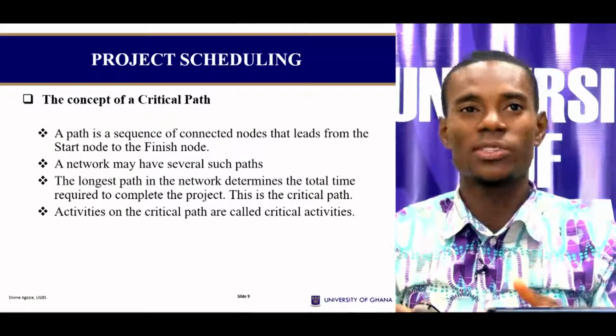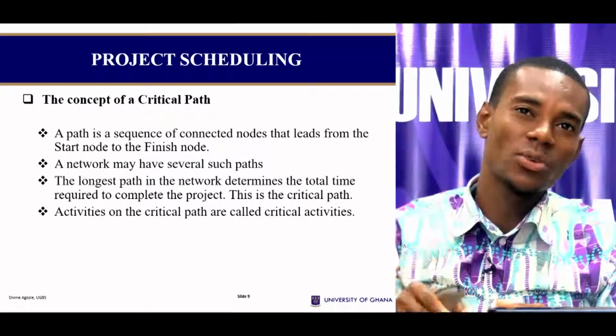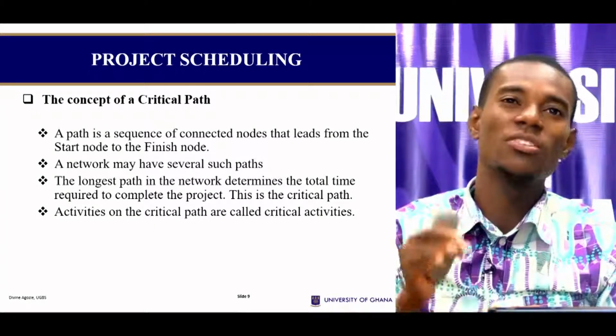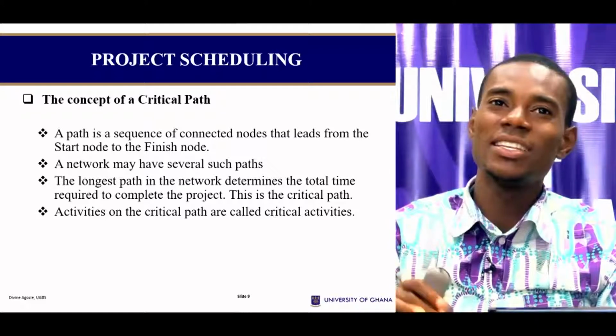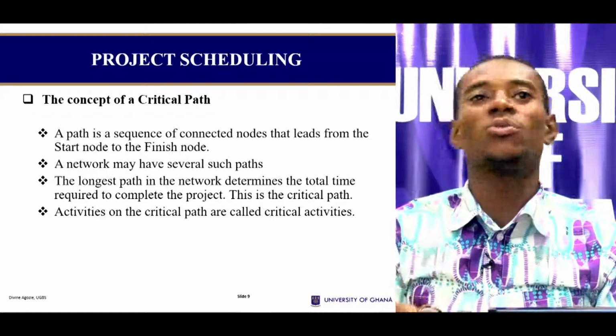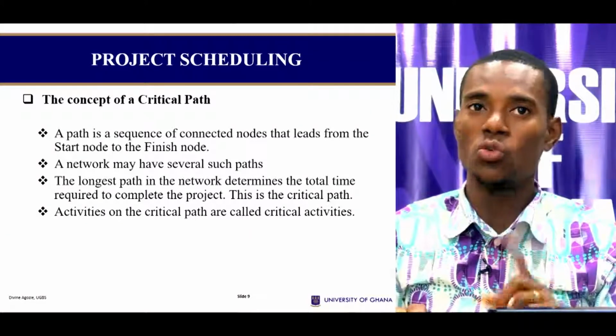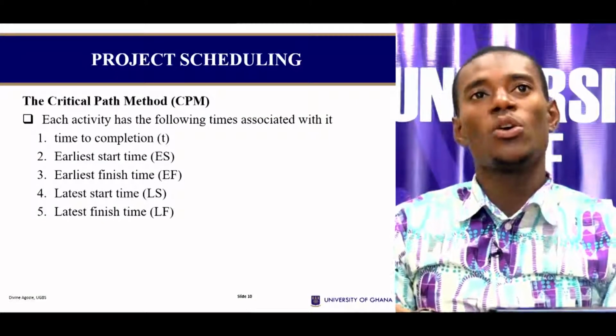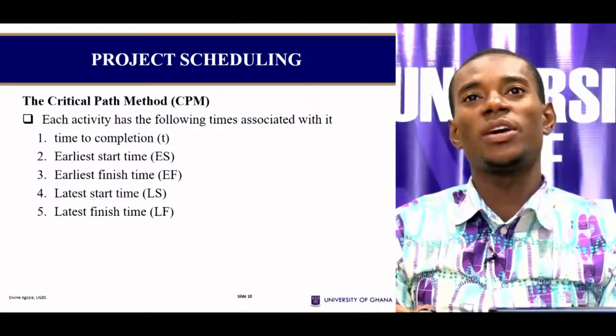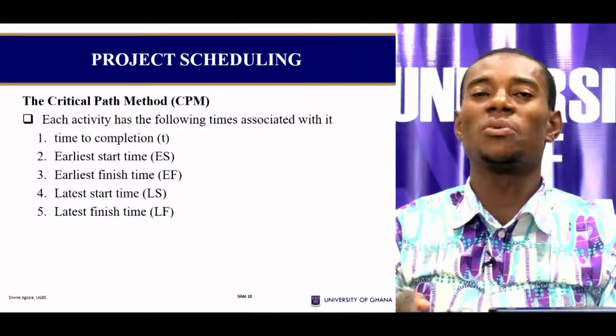And that is what this concept is. All those activities on the critical path are activities that you cannot afford to get delayed. Once they are delayed, the entire project would also get delayed, which you do not want, as we've seen previously.